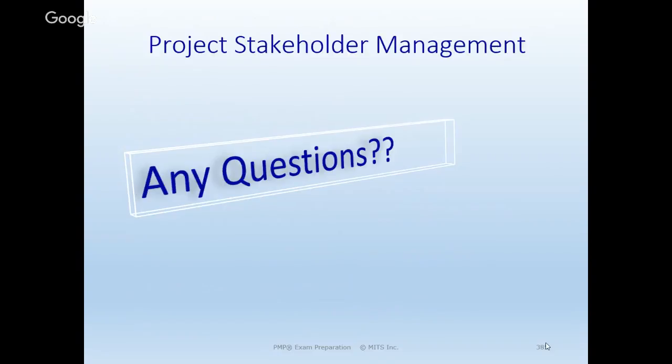In the planning stage, we probably have key planning leads already, maybe even our project team put together. Well, where do you acquire your team in 9.3? Then you don't have them yet when you're doing the whole planning. I mean, if you need 300 people to do software development, up front you may have your planning team. And typically you do. It's not like you don't have anybody, and it's not like we're soloing the planning. We probably have the key leads, either functional leads or tech leads, that can help us.